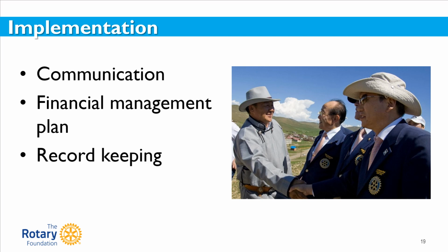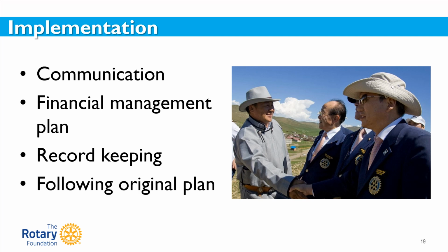Detailed grant records help with reporting on the use of grant funds, responding to inquiries, and increasing the transparency of how grant funds are managed. Remember, for global grants, you must follow the Rotary approved grant plan. Any changes to the scope or budget of your project require Rotary's approval.